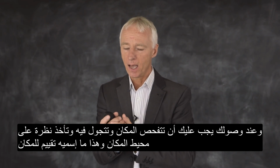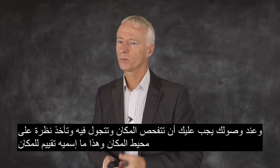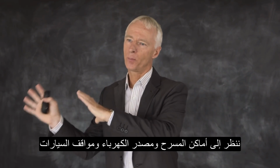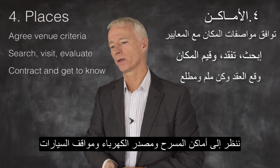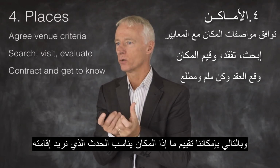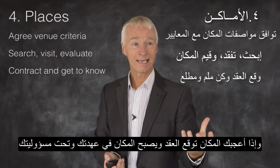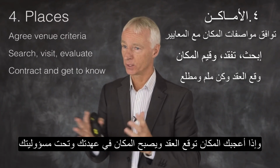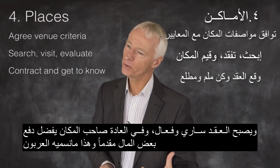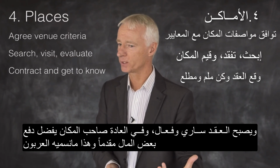I should say. And then when we're there, we need to do kind of what I call a venue evaluation. So we kind of walk around the building, we look at what's there, we look at where the stages are, the power, the parking, and all those sorts of things as well. So we're evaluating whether the venue fits what it is that we're trying to do. And if you like it, then we'll contract it. So that's where we sign away our life. We put a contract in place, and usually the venues tend to like us to put some money up front as well. We call it deposit.